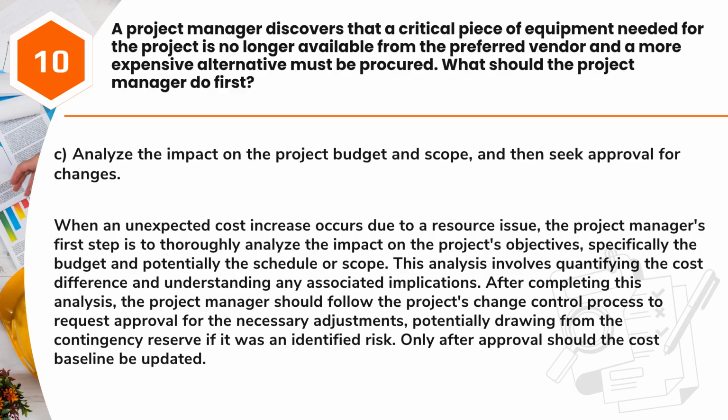After completing this analysis, the project manager should follow the project's change control process to request approval for the necessary adjustments, potentially drawing from the contingency reserve if it was an identified risk. Only after approval should the cost baseline be updated.